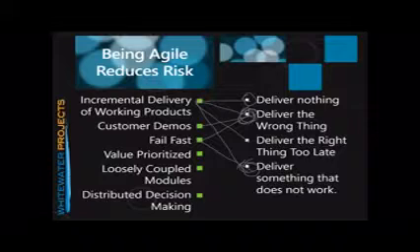When we take an agile approach, we do something called value prioritization. So I take all of the features that used to be in a requirement specification, right? Some big, thick document that we developed at the beginning of a project or product definition. And we break that down into little pieces that make it up, and we prioritize those. Every single one of them is prioritized. And we'll find out, actually, when we make them small enough that some of them aren't really necessary. But some of them are hugely important, and we want to deliver those hugely important ones first.